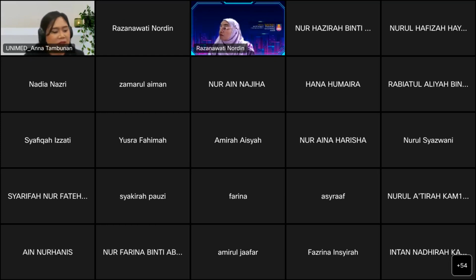It defines the work items, work packages, and deliverables that will be delivered during the execution phase of your project life cycle. So it is important to use a work breakdown structure to define your tasks and subtasks and prioritize them. And the next section, of course, on the following page, is SMART goals for your project proposal.